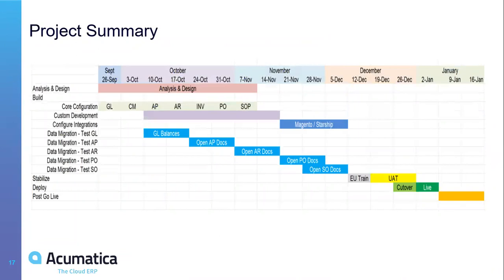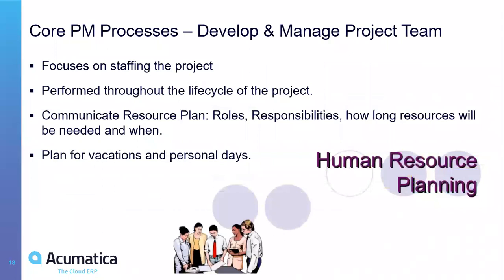So why? They need to prepare themselves. They need to provide time, right? For example, if I'm taking this one where go live is planned on the 2nd of January, right? This means nobody will be able to take holiday over Christmas or the beginning of the new year, because everybody will be needed for go live, right? And we are now in September, like it shows here. So we need to tell them now already, and we need to tell everybody now. So these are the times where the peak times are, where you will be very, very busy, and where we will need you, and where we need your help to make the project successful. So then focus on getting the right people into the project.